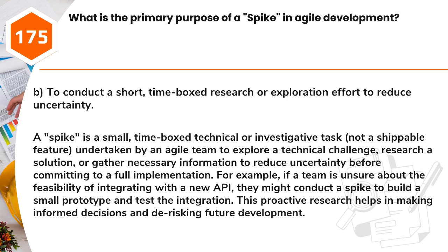For example, if a team is unsure about the feasibility of integrating with a new API, they might conduct a spike to build a small prototype and test the integration. This proactive research helps in making informed decisions and de-risking future development.